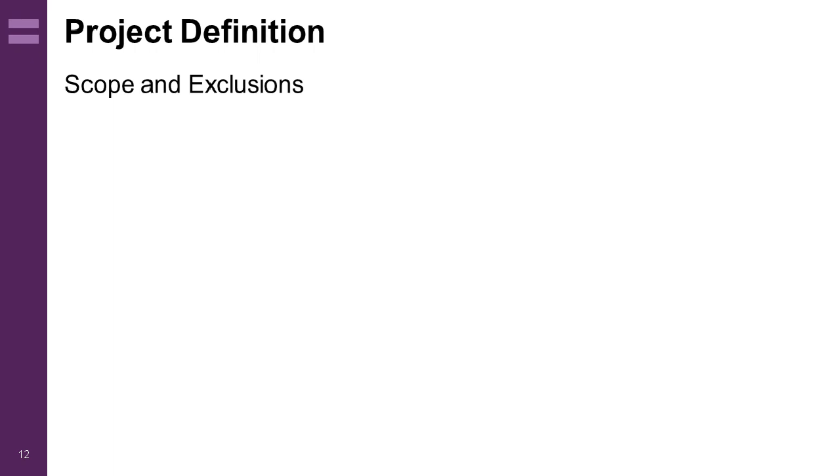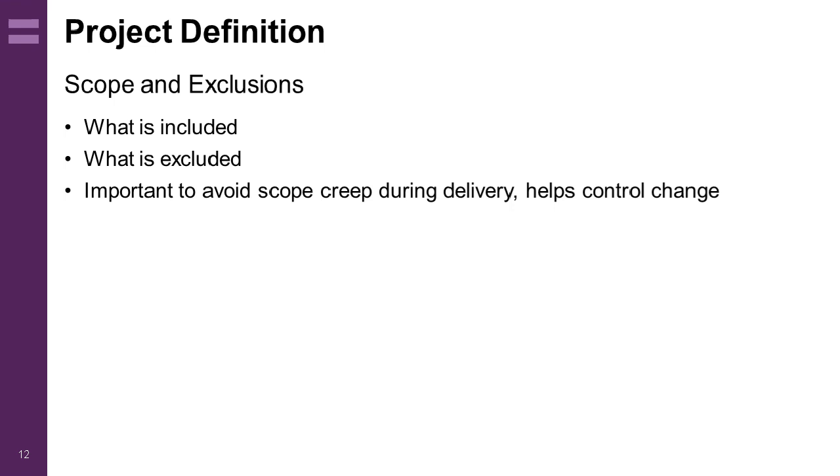As a project is time and cost bound, I'm sure you'll know about the project triangle and the dangers of scope creep. This section is used to define what is included and what is not included in a way that uncontrolled changes in scope cannot happen. Change in the project is inevitable as the project environment is never stable, but this section can ensure change can be controlled and the effect of change on cost, timing, quality, etc. can be fully considered before being approved.